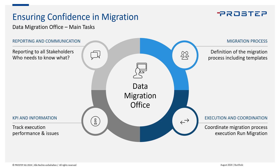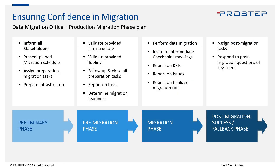Here's a quick example of how a productive migration plan could look at a high level. You can see four phases: preliminary, pre-migration, migration, and post-migration. It starts with informing all stakeholders that a migration is upcoming, assigning tasks, following up on tasks, and preparing infrastructure. Next actions include validating infrastructure, validating tooling, and reporting on task statuses. In the migration phase, you perform the actual data migration, report on KPIs and issues, and report on the final migration run. After migration, you assign post-migration tasks. The data migration office also works with many more templates — stakeholder lists, role definitions, and similar items.